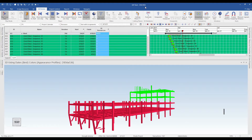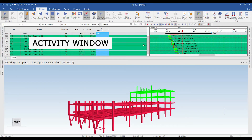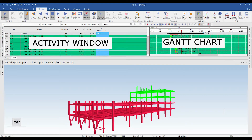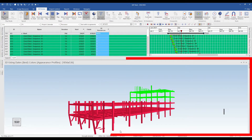A few peculiar things you need to understand, which are also similar to a standard planning tool like MSP or P6, is that it has activities and a Gantt on the right. One important thing that makes it different from traditional planning tools is the 3D window at the bottom of the screen.